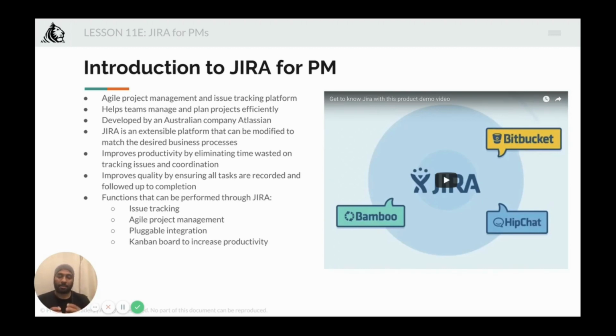Let's say if everything is good, then the frequency or the velocity at which new tasks are being added to the to-do list, to the backlog, would roughly be equal to the number of tasks that are getting into the doing and then done. So there is no, I would say, huge backlog that will be created, right? A huge backlog will be created only if the task in the second column, that is doing, is not getting completed, right?